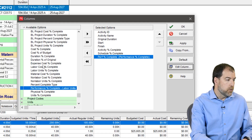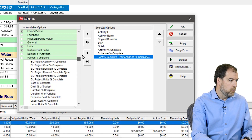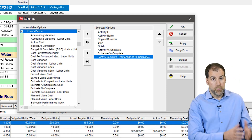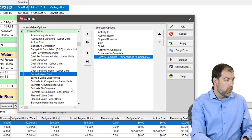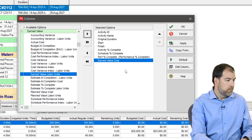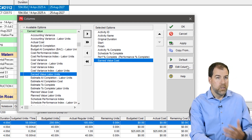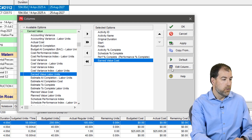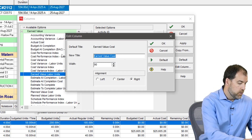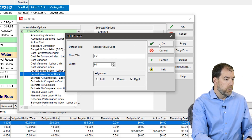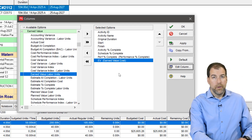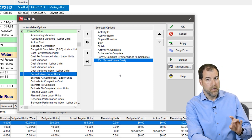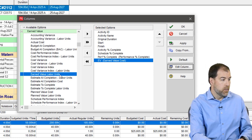Now let's go to our earned value fields. The first field we want is earned value cost — let's add that in. Once again, I'm going to truncate these for a really nice layout. I'll click earned value cost, edit it, and just call it 'EV.' There are three important fields here: earned value, actual cost, and planned value — so let's grab those.